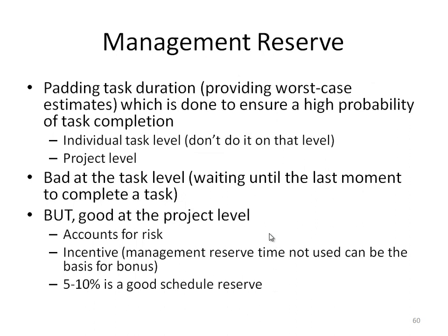Some of the strategies used by some of the management is to add more time for the task. So instead of saying that the task can be done in 1 week, I will say it will be done in 1.5 weeks or 2 weeks, in case something like that happens, or in case the customer asks for a compressed schedule. So they will have a slack for every task, including the critical path, because they added extra time during the estimation of task duration.